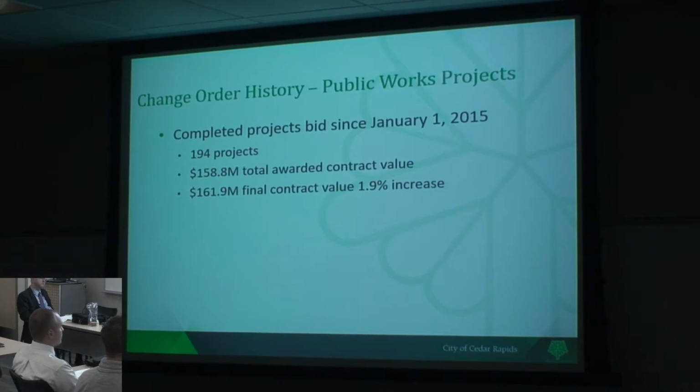So since you're budgeting 10%, then at the end of the year, you see what's left in the pot, and that goes back into next year's programs? Yes. If a project happens to go over that contingency, we do have to cover that with additional funds, possibly from other projects, but many times it will get transferred into our reserves, and then that will be cash on hand that we can use for projects in our CIP program in upcoming years.